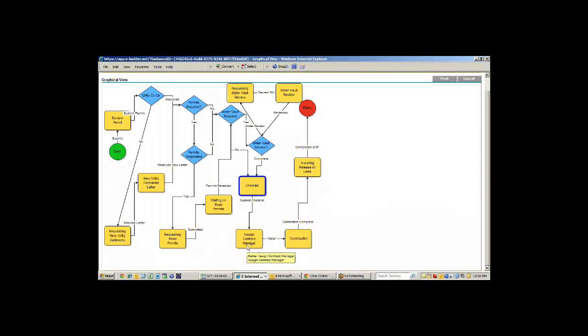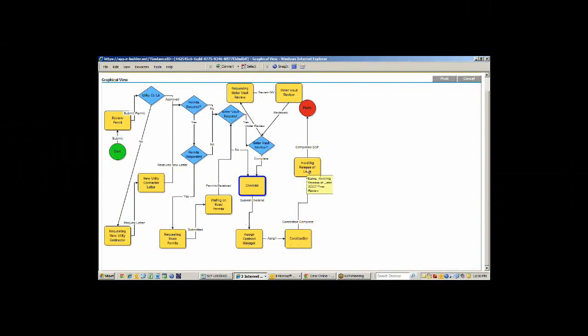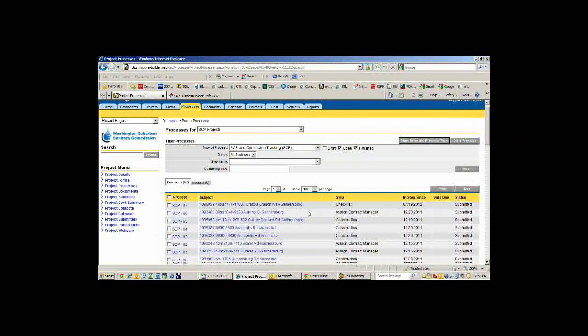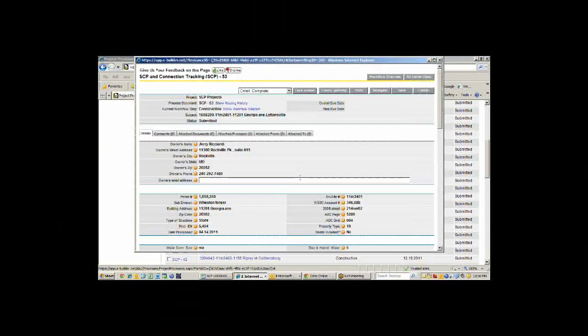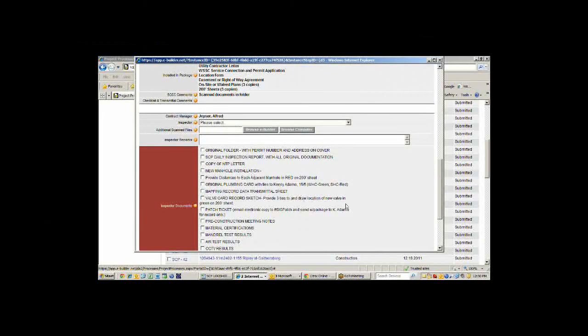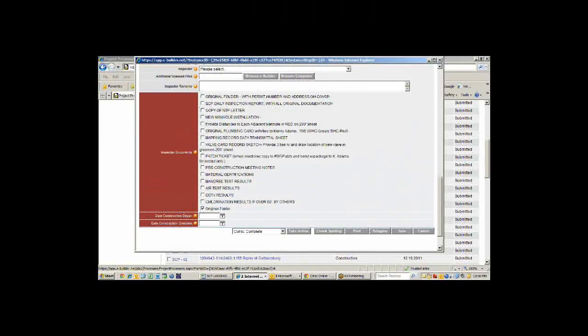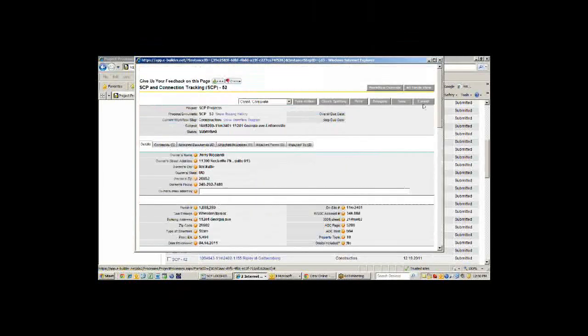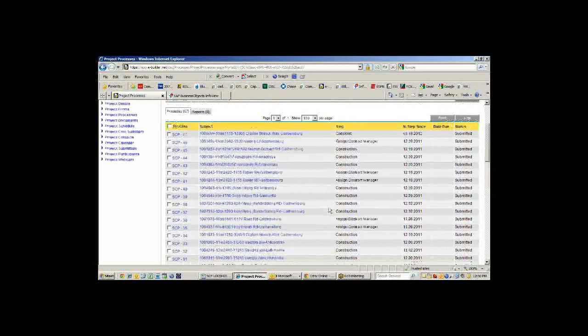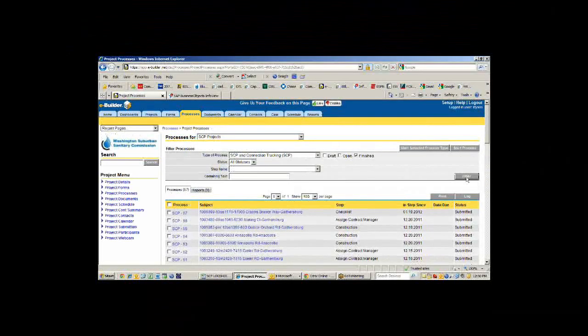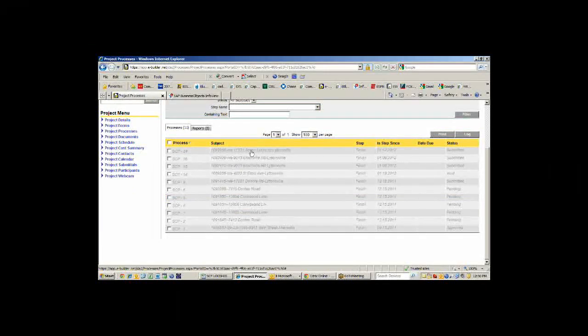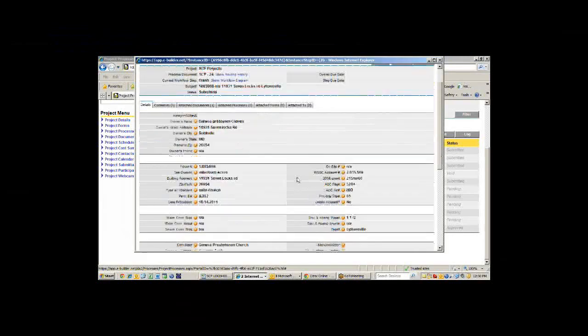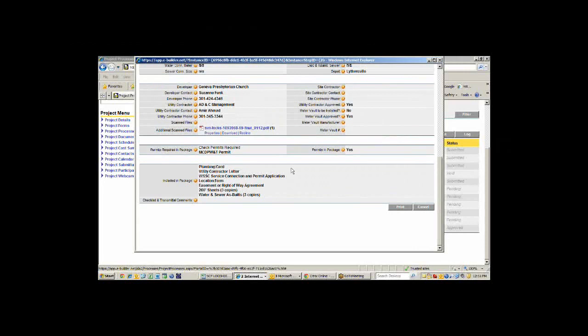It'll go to the contract manager at one of the depots. They'll assign a contract manager for this particular job. Then it goes through the rest of the steps. If I go back here, I can look at one of these that's in construction. I can open it up and see that it's in construction. It's been assigned to Alfred Joyner. They haven't assigned an inspector yet, but we're waiting for them to complete what documents they're going to send back to us plus the date of construction. Once that's done, then it'll go to awaiting release of leads. I don't have any of those, but if I just show you the finished ones, this is the ones we finished since we started this particular process. If I look at the finished one, it shows me everything that happened, all the information and when it was completed.